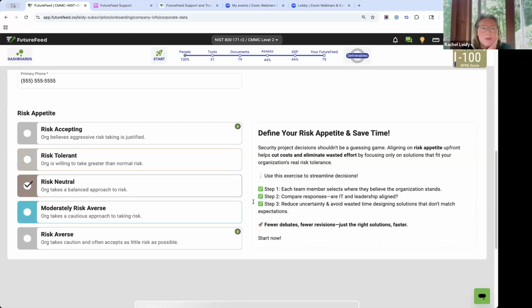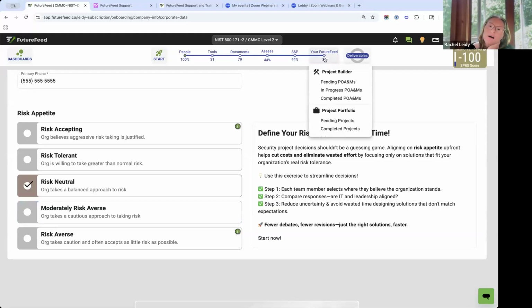So how you'll use this information is when you start working within your system POAM and you're trying to prioritize remediation work. If you have 100 POAM items and you have a small team, not everything is going to be fixed or worked on right away. You're going to have to plan out your remediation efforts, and typically you're going to remediate things that have greater risk or greater impact to the company.